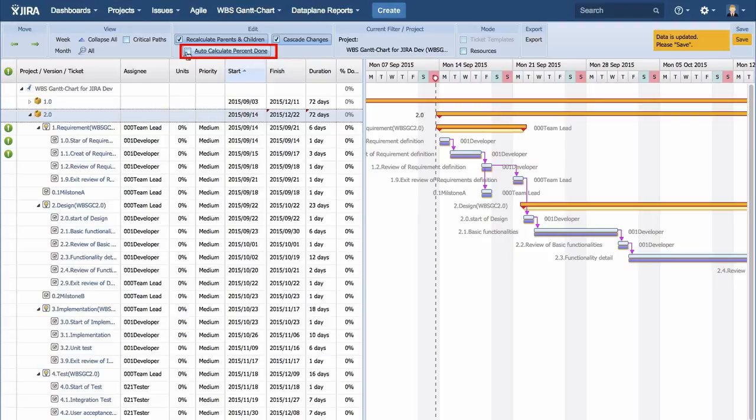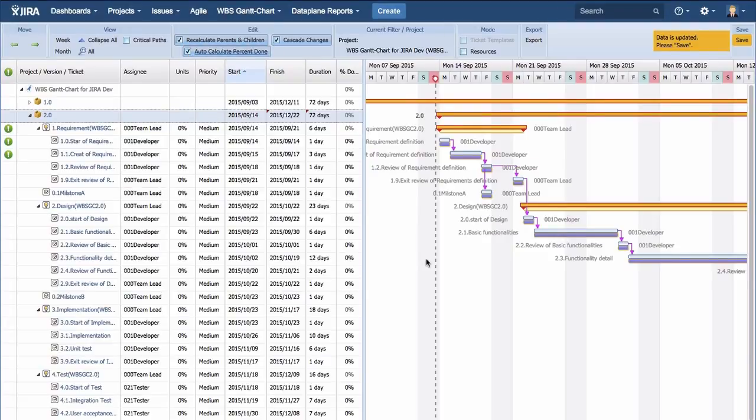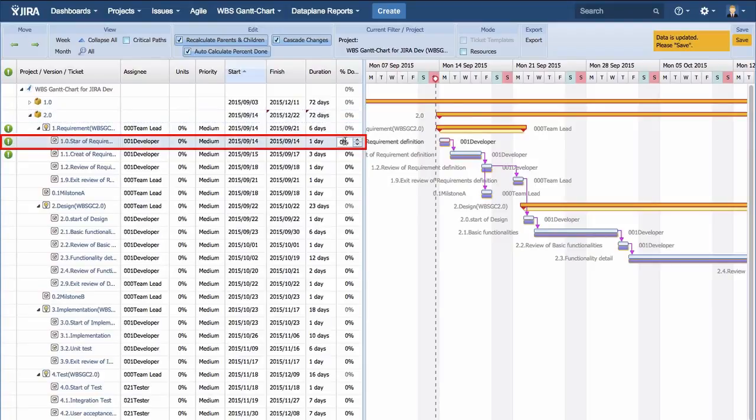Next, check the box of auto-calculate percent done and fill in percent done. Then, the percent done of the parent ticket is automatically calculated.